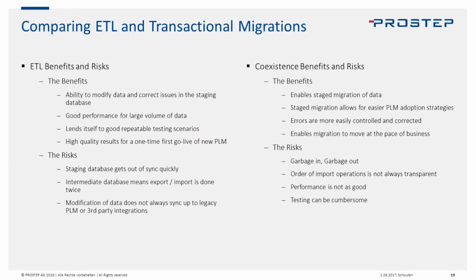Some of the risks, unlike in ETL, garbage in, garbage out, there's not that intermediate database where you can go in and clean stuff up, and you're going to see that that could be an issue that you might need to correct. You might not know exactly what order you need to import the data without doing a thorough vetting, and that is because sometimes data has dependencies on each other, and you need to really examine those dependencies in order to see that the order is correct.